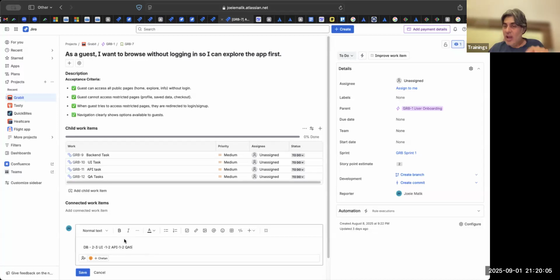So let us say the DB guy says 3 hours. Then he logs the hours into actuals, how many hours it actually took. Then I can run a report and find out, okay, the estimation on this story was 3 hours, but he took 4.5 hours. And then you can have a discussion on why it took more or less time, whatever. But again, my suggestion to you would be, don't get into too much of hours, but a lot of organizations do it, actuals versus planned in terms of hours.